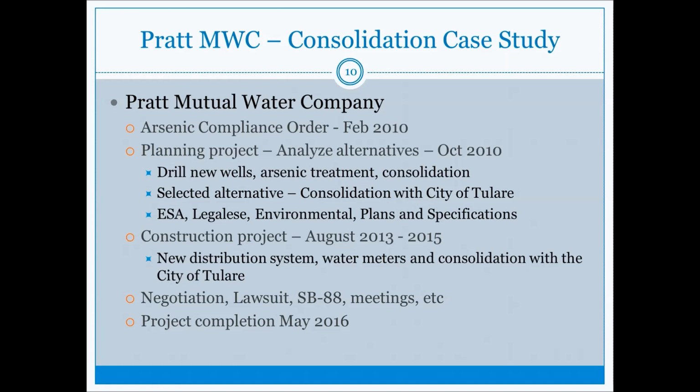And they went forward with the cooperation of the city of Tulare at this time with developing an extraterritorial services agreement, some other legalese, environmental documents, plans, and specifications. And from there, jumped into a construction project which included a new distribution system, water meters, and some transmission mains to consolidate them with the city of Tulare.